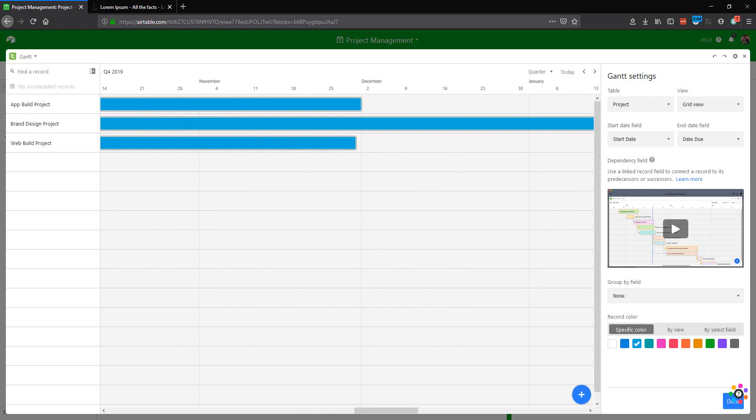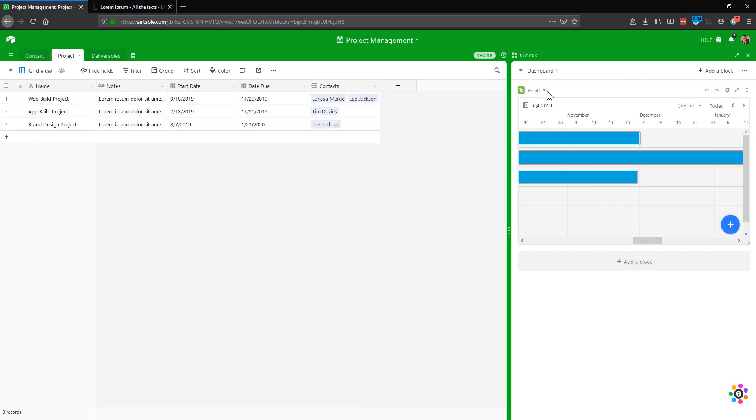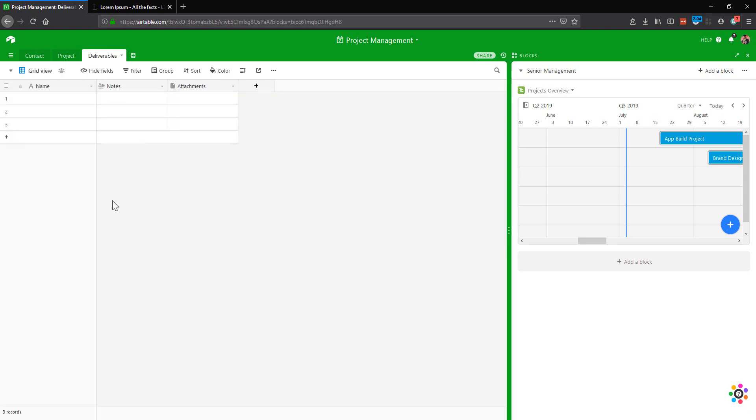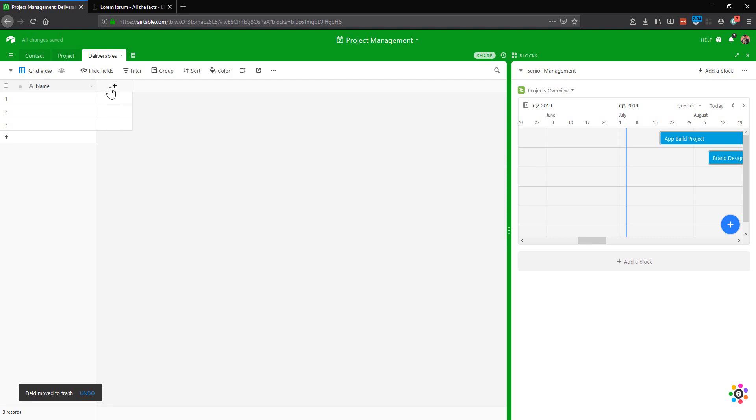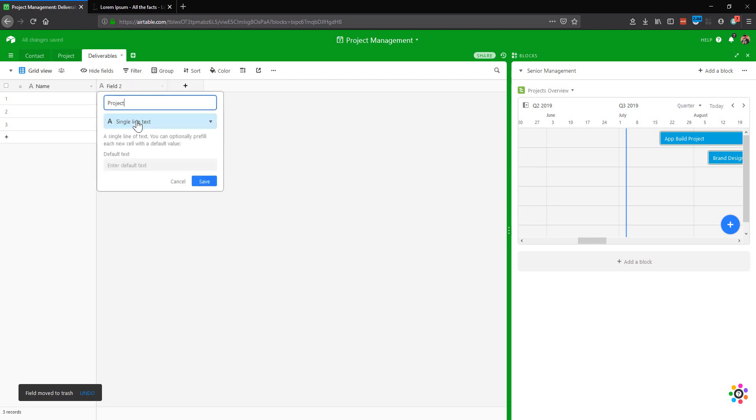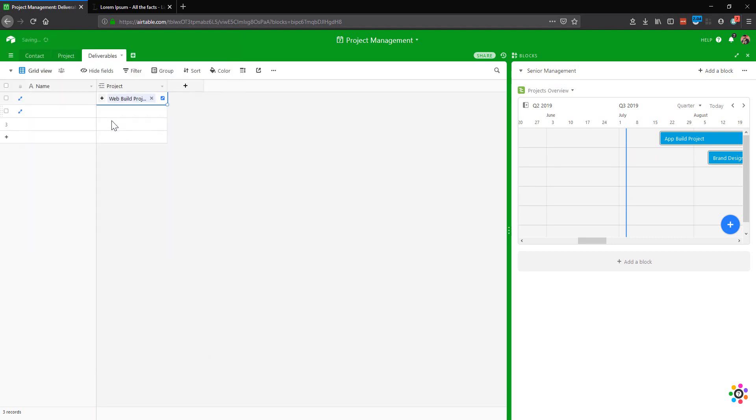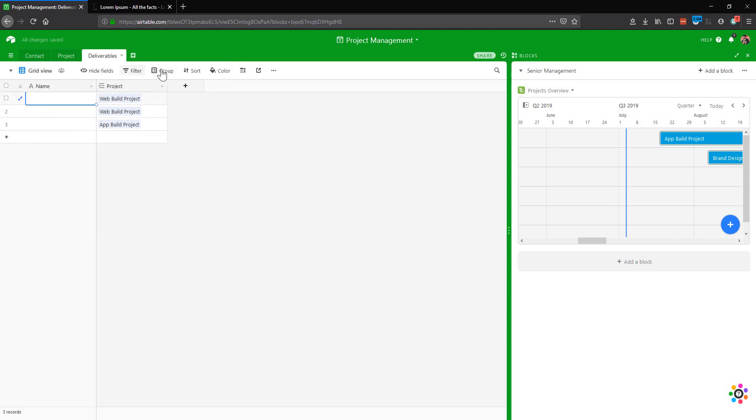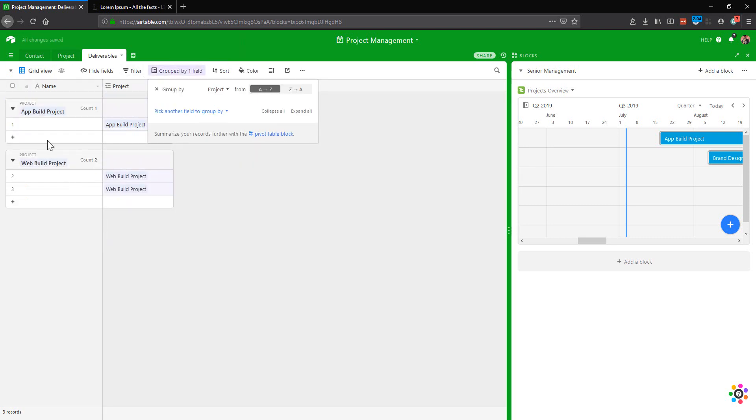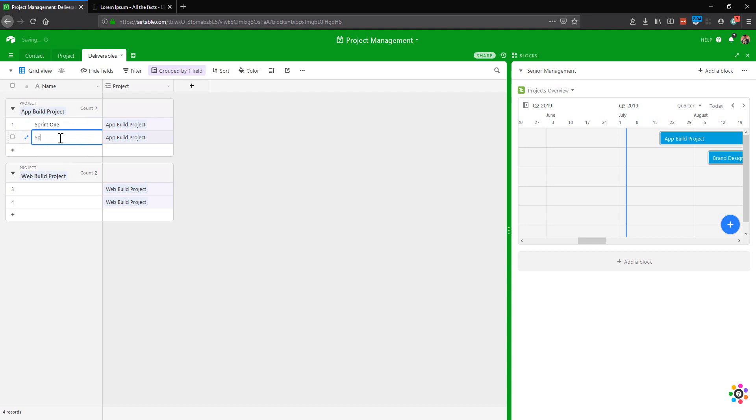Against any project, we're going to have deliverables. That's the different sections that we're providing or the different elements of the project. So let's get rid of these two fields. We'll keep the name field as the description of our particular deliverable. But we want to make sure that we can link this to the project so that we're able to group these to the project. So let's link a couple of these to the web build project and one to the app build project. Then what we'll do is we'll group this by project so that we can see this much clearer. And then we can put in some deliverables. So I'm just going to put in sprint one and sprint two.